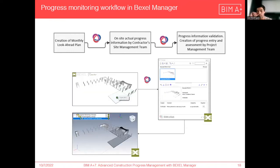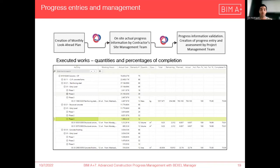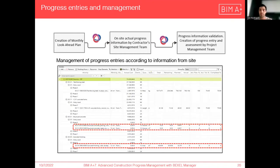On site, the site management proceeds to open this file on a BIM viewer to further select the actual executed elements directly on the viewer. Once finished, it sends back this information to the project management team, also using BCF files, which is later entered in Bexel to control the percentage of works completed. Here we can see the progress entered as the percentage of completion of each element divided by tasks and activities. The project manager can then manage this information and make adjustments according to the site information in a simpler way.